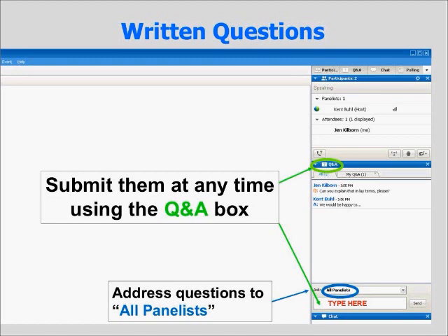Now, as a matter of fact, I didn't want to present too much detail to confuse people. I was trying to keep it simple, but there is an individual categorical exclusion, even if it's new construction, if it's an individual action on a 1 to 4 family structure. So even if you're doing new construction on a 1 to 4 family structure, that may itself be a categorical exclusion, and that may not require the full NEPA assessment. You could always do more, but if you want to, you could do the categorical exclusion.